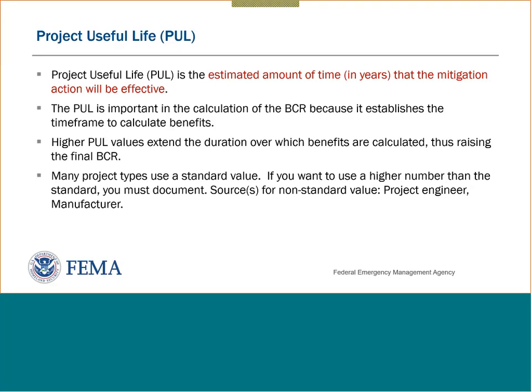And so as we're talking about what we're doing in our community, we can also be thinking about how long something is intended to last and how cost effective it is going to be. So those are some of the standard values, and you can use a higher number than the standard. But in order to do that, you've got to have a credible source, and you've got to provide documentation to back this up. For instance, a good source for non-standard values comes from that project engineer, those trustee engineers, or the manufacturer of the equipment that you plan on installing.